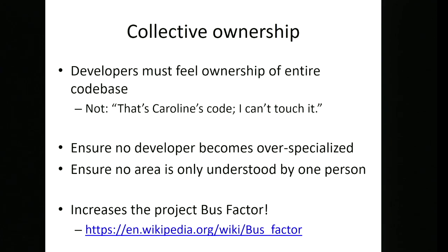we'd have a serious hiatus in the project where we got other people up to speed on that part of the code base. So within your teams in the lab, try and think about whether someone is doing a bit more of the work on, say, the underlying database, or whether someone is doing a bit too much work on the user interface, and try and switch it about a bit to keep that bus factor as high as possible.